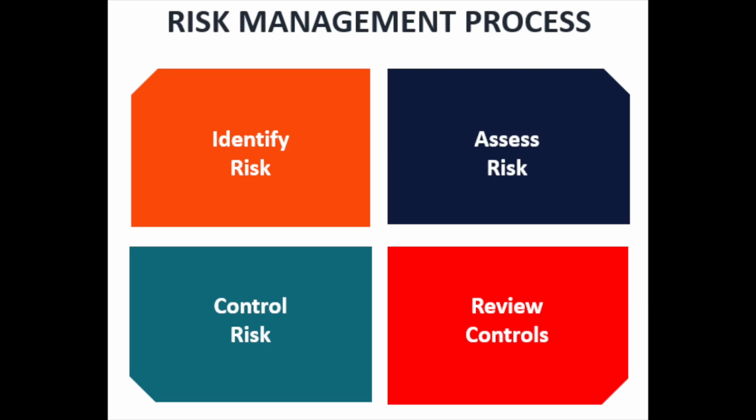Before we can manage risk, we've got to figure out what they are. So, that's that first step, identify risk, is going to get us started at least, right? To go about doing this, there's a handful of ways. We can talk to subject matter experts, people that maybe know the tools, have worked on similar projects, lessons learned documentation, really any project documents from previous projects that might be similar or have some similarities at the least. But those are all tools we can utilize to identify risk.